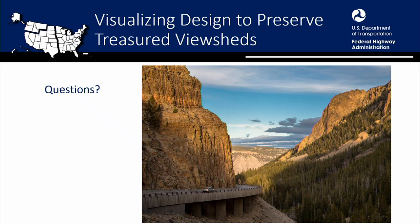But by the time we developed it, we pretty much already committed to the solution. And this just helped reinforce people's decisions. We're working on another project where we are still in the alternatives analysis phase, and we've got multiple alternatives that have pros and cons. So what I'm thinking now is once we get a little bit further with those, maybe we model multiple alternatives and then give people a chance to see those. It'll help with selecting and winnowing those down.